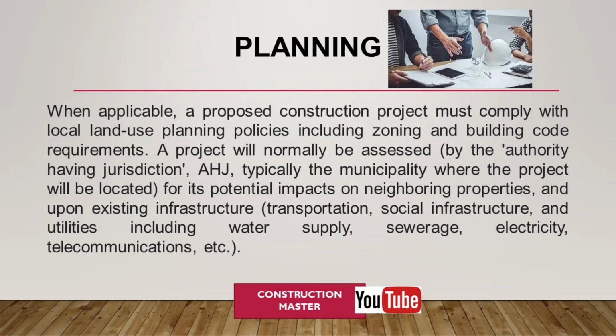Data may be gathered through site analysis, site surveys, and geotechnical investigations. Construction normally cannot start until planning permission has been granted, and may require preparatory work to ensure relevant infrastructure has been upgraded before building work can commence. Preparatory works will also include surveys of existing utility lines to avoid damage causing outages and other hazardous situations. More details will be discussed in the following videos.